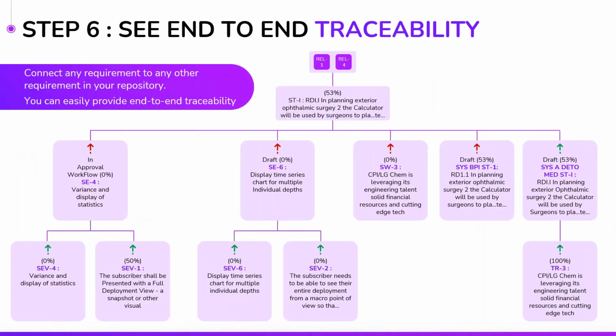Once different stakeholders create those chains, for example, the business analyst has talked to the product manager, they have connected their work to the engineering teams, which have connected their work to the test cases, you can build something called a trace tree, which is a hierarchical daisy chain that shows how one requirement has gotten broken up into multiple sub requirements, and more importantly, where there is change in these requirements that has not been digested.